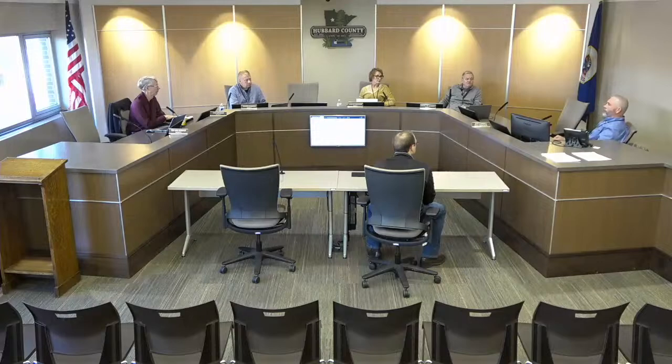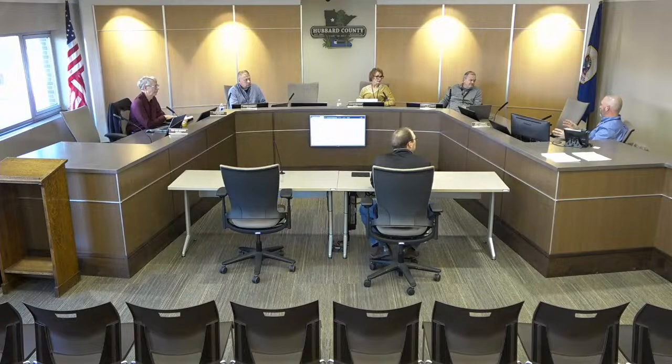outage. So I've got Fred and his staff knowing they're going to have to be in that Friday morning to make sure the routers come on, and Bobby's going to be working to make sure that the door access and all those systems come back. When the power goes out, sometimes you have to go in and kind of encourage them to start up again. So we'll have that plan.